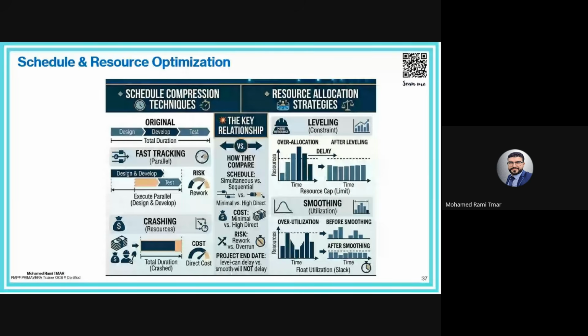Resource leveling is different. Resource leveling is adjust activity even if it's impacting the schedule. Okay, we don't care if this activity has float or not. The project duration may increase. Limited number of crews, delay some activity. Sometimes we don't have any choice, especially if the over allocation is detected in a critical activity. Okay, so the idea here is simple.